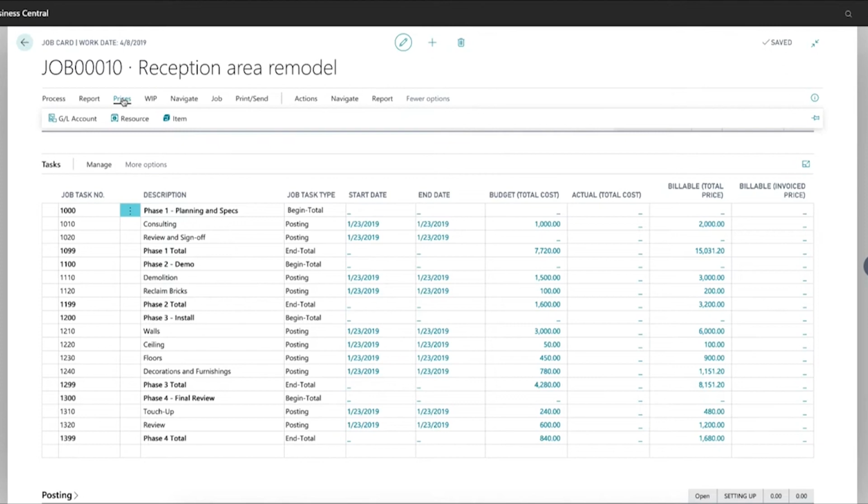So if you have consumable items that are being used up in the process, then you would do that through inventory control. And the general ledger, of course, allows you to bypass either the resource or the item configuration so that you can just hit your GL directly. Now, in addition to that, you have a number of copy functions in the system. So if you work off templates where certain jobs are similar to other jobs and you like to bring over these levels of details from other existing jobs you've done in the past, you can do that with copy functionality quite easily.